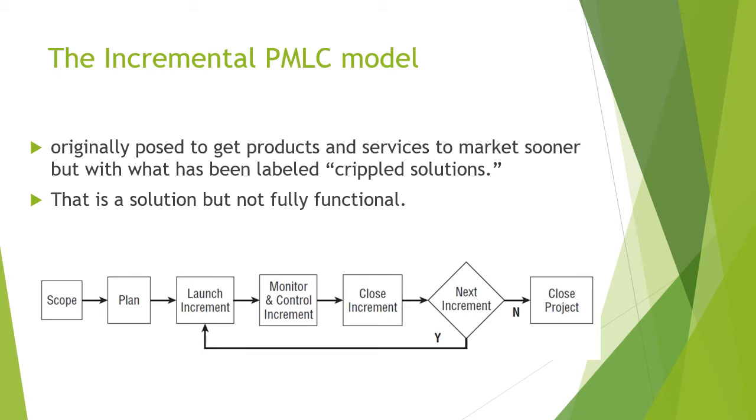So if it is a software project, for instance, for a cafeteria or a shop, what is the shop going to do with the planned software? Is it going to produce reports? Is it going to do the sales? Is it going to include the delivery reports or the financial information or the manpower, the human resource information as well? So what is going to be included in the software project and what is not to be included? That is the scope. We start with the scope. What are we going to do?